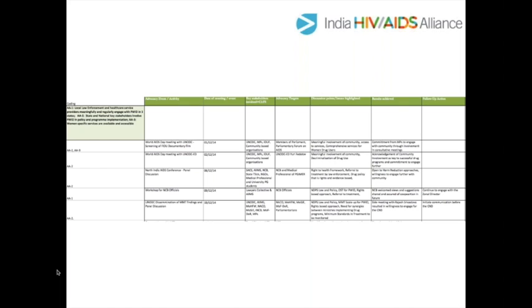And you can see that the left-hand column has AA, the advocacy asks. So the first line is advocacy asks 2 and 3. You can see the entries in the log, but you can see they don't have to be huge. You don't have to do 15, 20 entries a day. You can see on the dates here, they did one on one day, one the next day, one 3 or 4 days later, one 3 days later, and then one a couple of weeks later, maybe, just about. So it doesn't have to be done every day. If you just write something in once a week, after a 3-year project, you've still got maybe 145, 150 entries, which can be really useful in seeing what kind of activities are taking place during the project.